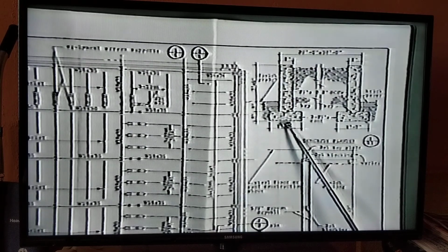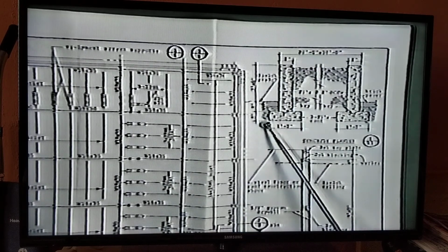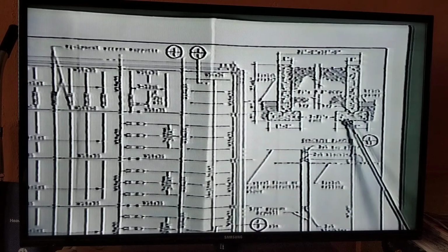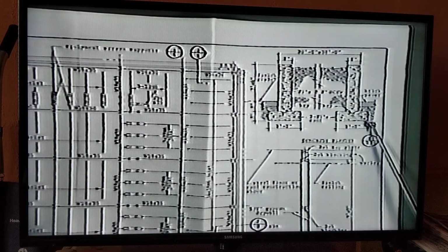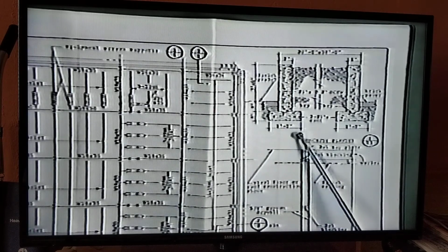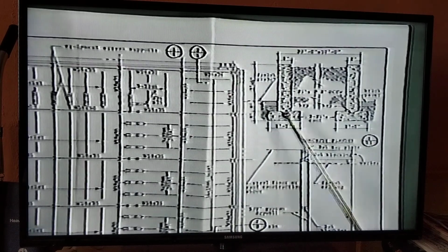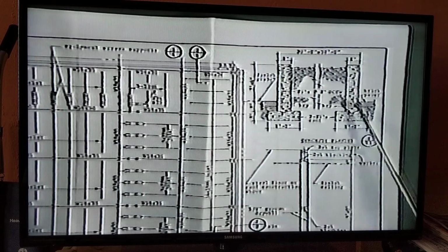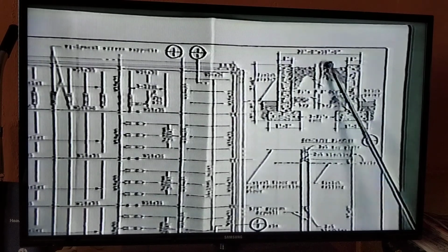We would then add 10 inches to that to get to the outside on this side, and 10 inches to that to get to the outside on this side. So 19 feet 4 inches plus 1 foot 8 inches will get us to the outside of this going in the 20-foot direction. In the 10-foot direction, we do the same thing.